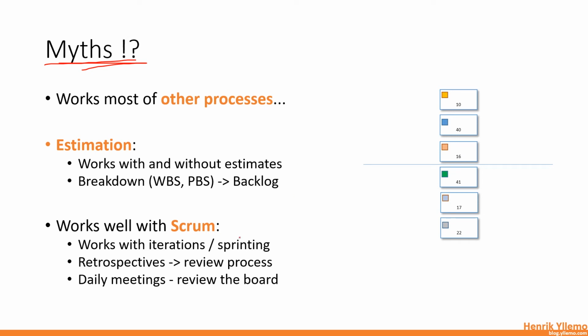One of the things here is that you typically hear the word Scrum board. Scrum board, it's basically a Kanban board that they branded as a Scrum board. So Kanban works really good together with Scrum. You can use it in the same way as you do iterations in Scrum. You can have iterations in Kanban as well. You don't have to, but you can say a limitation: we have a release every third week or something like that within Kanban, and whatever has been ready for that period is going to ship as well.